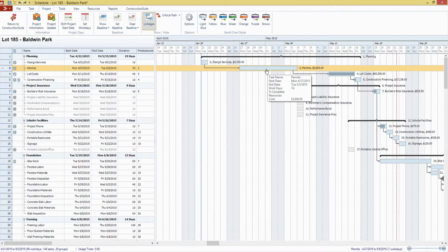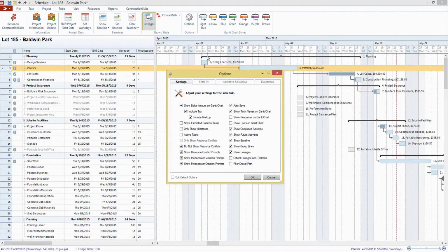So if our standard Monday to Friday work week doesn't include Saturday and Sunday, and we have a task with a 7-day duration that extends over the weekend, the task will still remain 7 days in length, but it will extend over the weekend for us, so that it actually covers all the amount of time that we need to complete it.